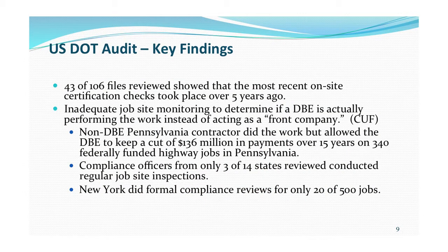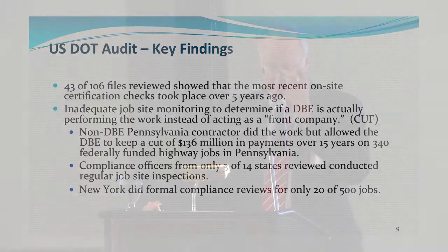In Pennsylvania, a non-DBE did the work, siphoning off $136 million over 15 years to the DBE in basically a fraud. Only 3 of 14 states had regular job site inspections to ensure CUF, and New York did a compliance review on only 20 of 500 jobs.